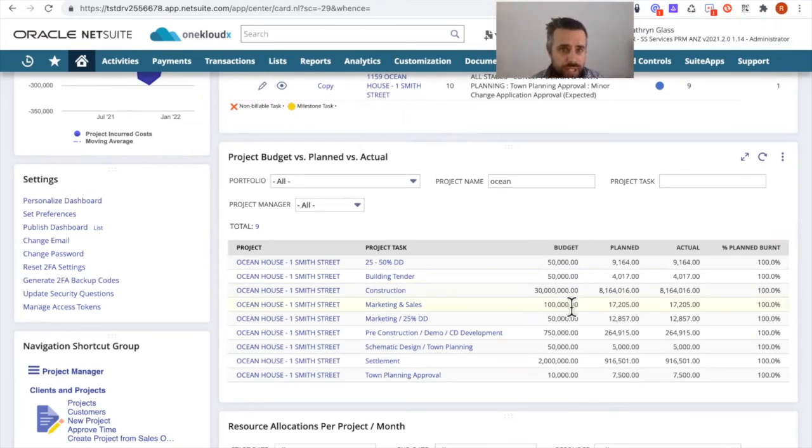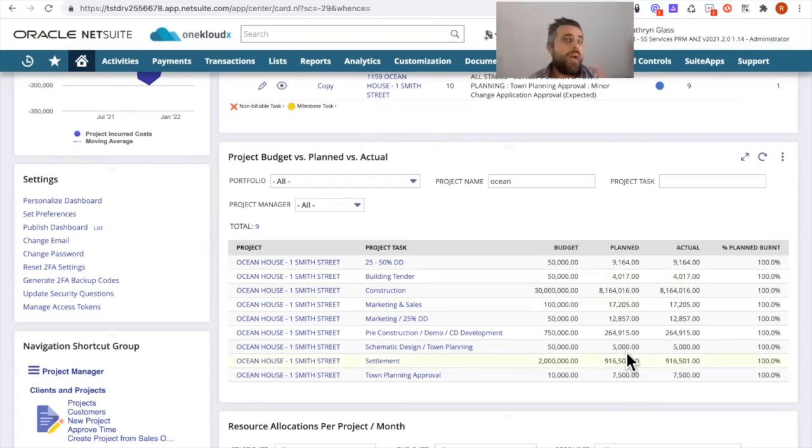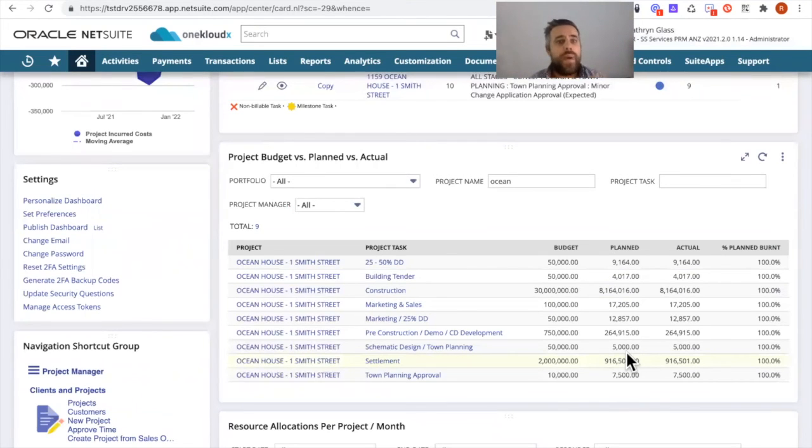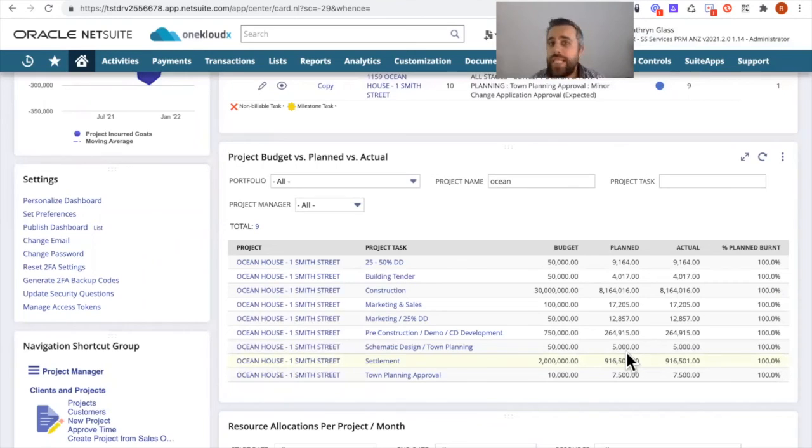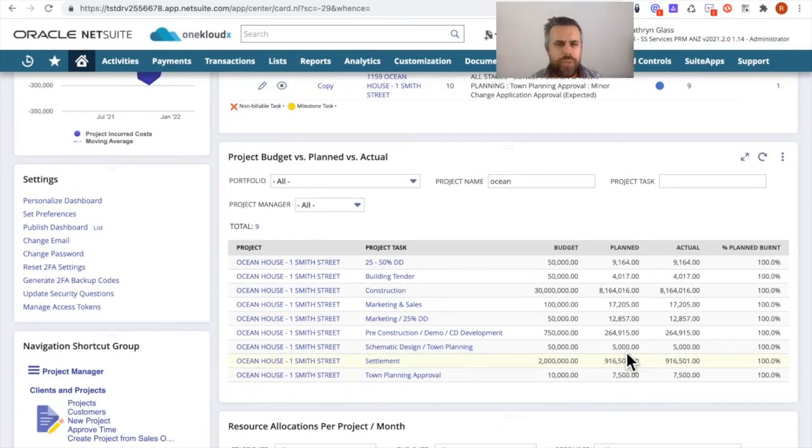What the estimated budget is that's contained in the work breakdown structure of that project, how much is actually planned in terms of how many purchase orders have been entered against the relevant project task by using the suite app that NetSuite's got on their suite app store called Procurement to Project Task that you can easily freely download.